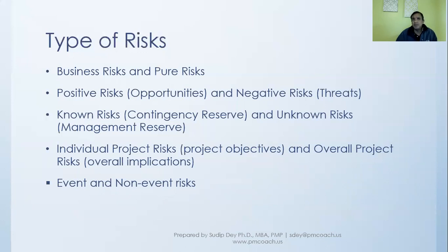For example, you are drawing requirement documents, and there is ambiguity in terms of what the user has told us and what we have understood, and that may result in some risk. So this is called ambiguity risk, because there is a gap in what was told to us, what we have understood, and what we might go and implement.